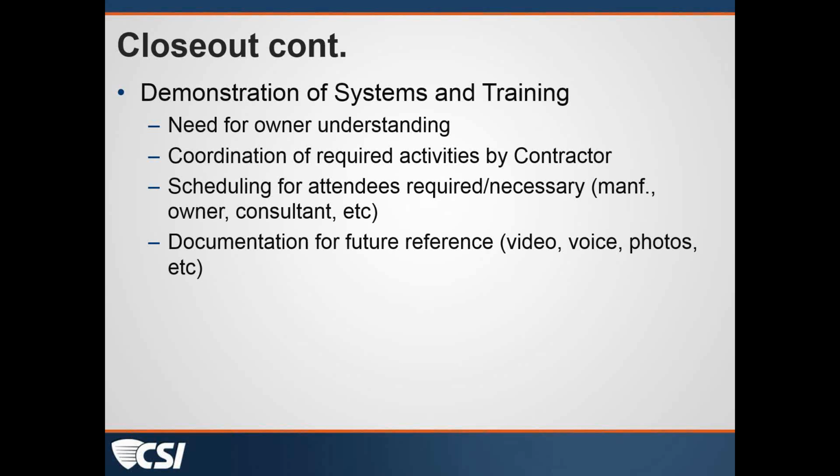So I think they are different things as Doug defines them there, and they clearly carry some legalistic concerns when you're using them in the contract. And you can always define them in your documents. Go to your supplemental general conditions and say definitions, "as-built drawings," in quotes, this is the set of documents that the contractor's marking up at the job site.